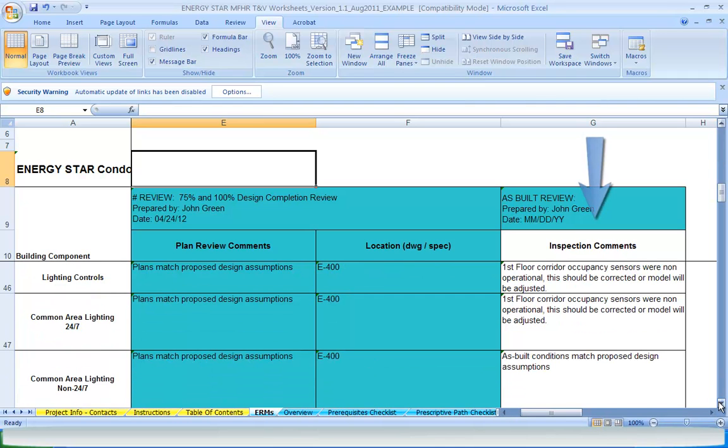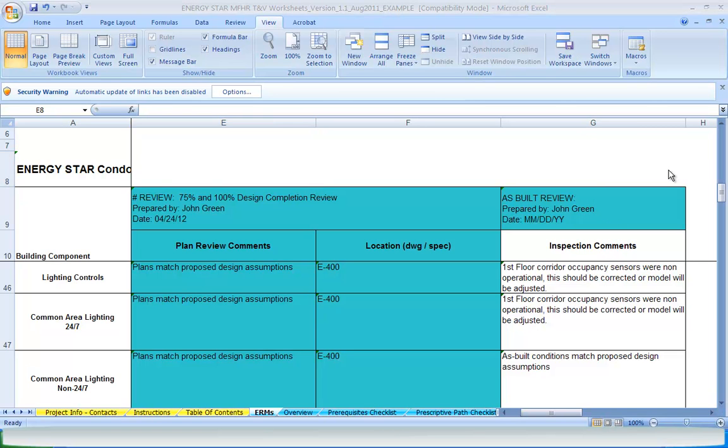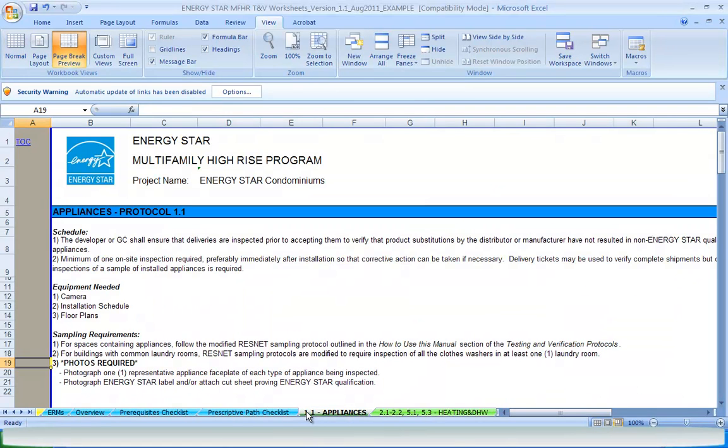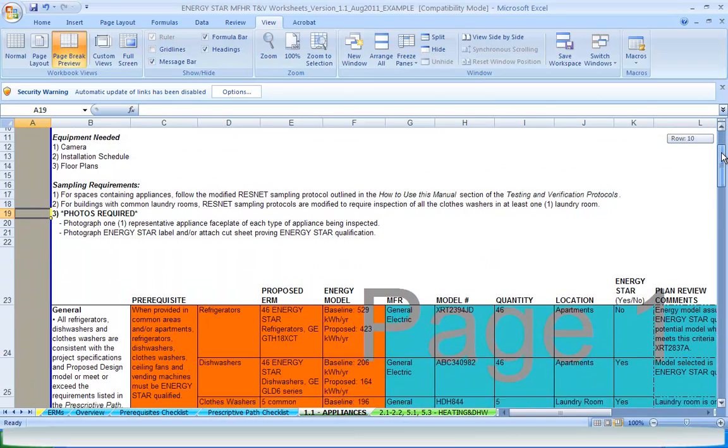The process is repeated again after all inspections are complete to confirm the final building is consistent with the proposed design model, or meets or exceeds the requirements listed in the prescriptive path. Now let's look at how the proposed method of compliance and values used in energy model columns are linked to relevant cells and tabs throughout the individual TNV worksheets, and where the plan review and inspection comments are coming from.